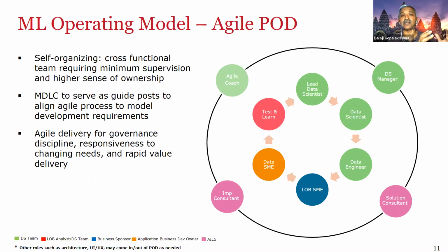When you have a very clear idea in terms of what you need to go after, then we want to empower this team, right? We want to empower the people who are building models, who are hands-on, to be able to take those decisions on a day-to-day basis, because they are the closest, they understand the problem. And as a team, they will decide what are the next steps that need to happen, and they will do it on a very continual basis. So every day they will meet for about 15 minutes. It's called the daily stand-up. They will discuss among themselves, hey, what are the things that we worked on today? Did anybody face any challenges? So that they can mutually exchange some ideas. And then they go back with some tasks for individuals, right? So they know what each individual has to do, but it's a very collaborative setup as well.